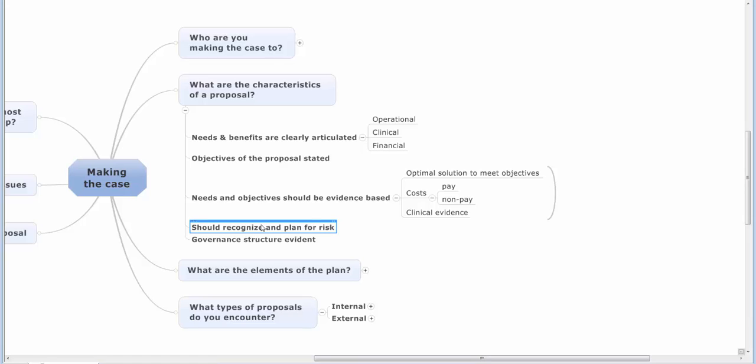So let's take the automation example. So we need to get the automation in. We get the green light to do it, and then it turns out when the engineers come to try and install it, they find they don't have the right type of power supply, the water isn't the right quality, they need to have a new gas line, or whatever it is. If you haven't considered that risk aspect ahead of time, then you could get very unstuck in your proposal, and you could fail to meet an objective that you could have fully accepted to meet or expected to meet.